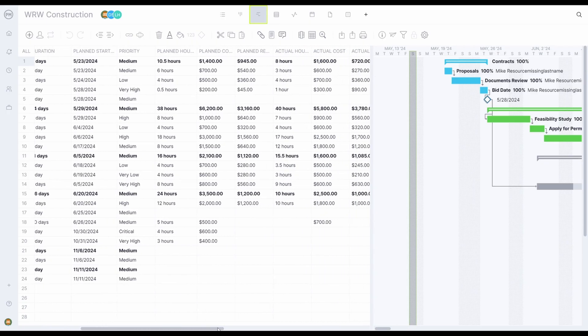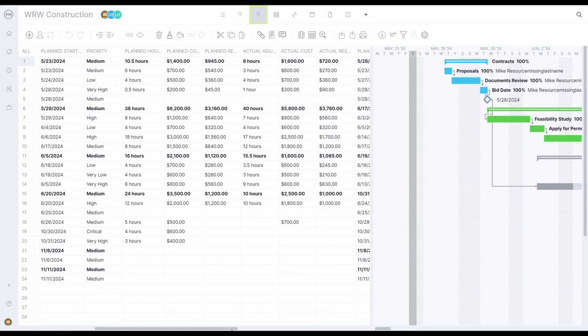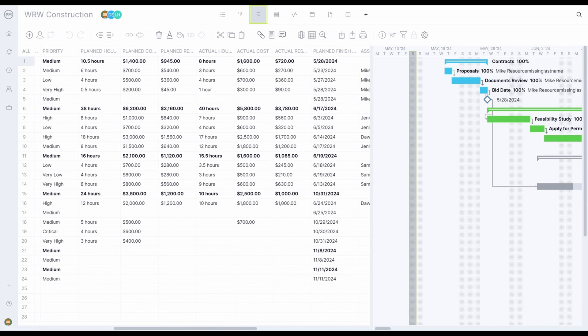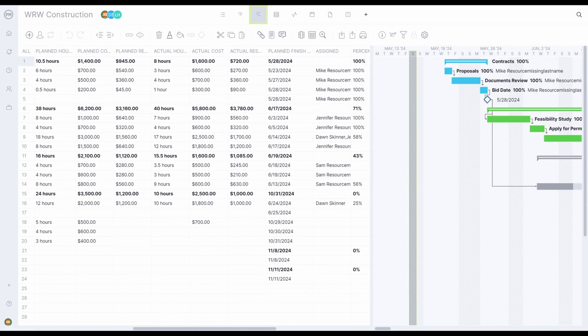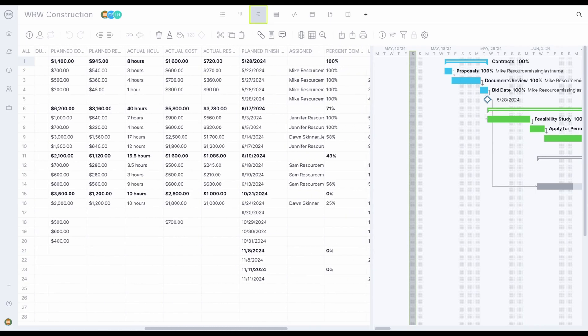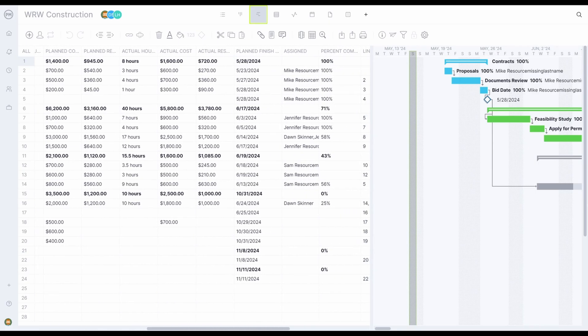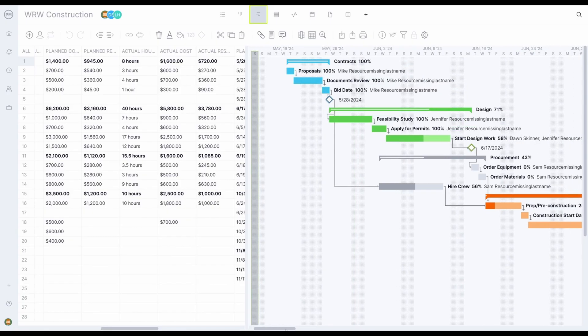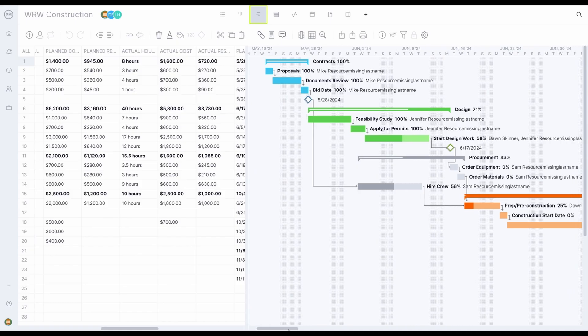Plan versus actual data for progress, hours and resource costs, assignees, baseline start, and even custom data at the project and portfolio level. On the right, you'll see the visual representation of that data in the form of a timeline.